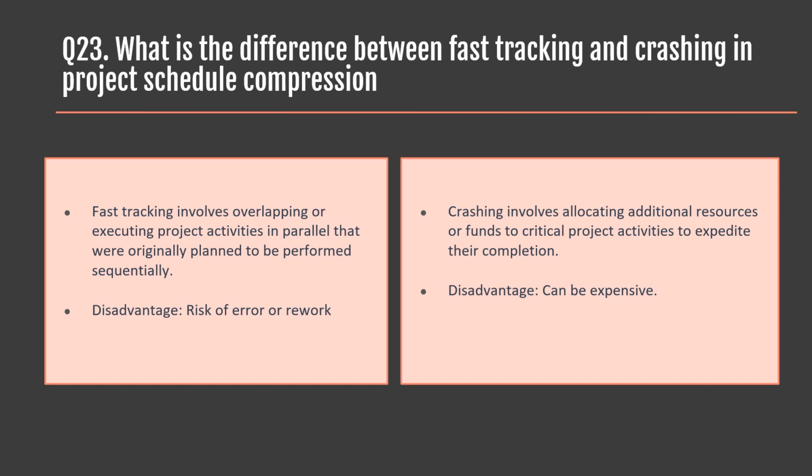For example, the development of the user interface (UI) design can be started while the backend programming is still in progress, potentially reducing the overall development time. But there are chances of redundant fields on screen being developed without having any actual functionality involved, like a click-to-action button to track the delivery of food live when the feature is not being developed functionally with respect to backend.